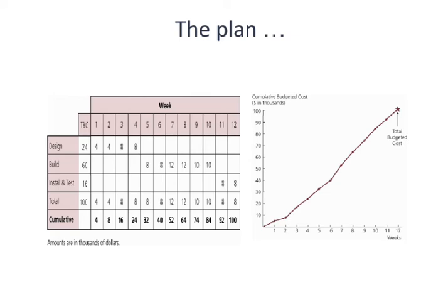That adds to the $24,000 because we can't go over the TBC of that work package, but we can distribute it in an uneven way if we know that's how the work is going to be executed. And we need to do that if at all possible. If we don't, then we're going to have all types of alarms going off during our control process as we track, because we're going to see that money is not being spent at the right pace. We need to have an estimate of the pace at which the money should be spent.